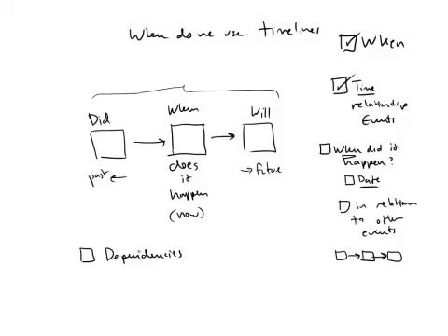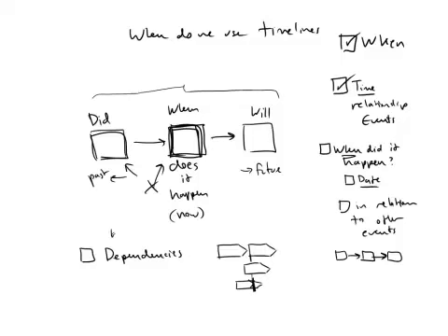And what we mean by dependencies is, let's say that this thing simply can't happen until that thing has already happened. And that's where we got back into our Gantt chart, because we could show that, well, everything doesn't just run necessarily in one line. There could be these parallel lines, like we saw back with our little NASA chart. And this one can't start until this one is done. So if we want to show time-based dependencies, again, that's when we want to show a timeline.